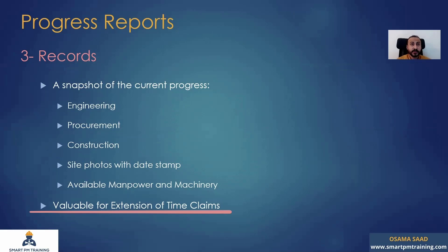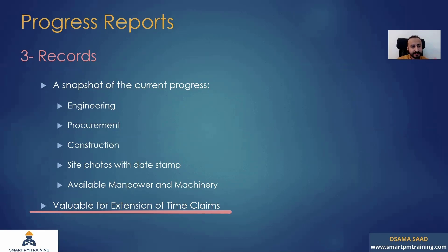For example, one month ago, you weren't able to start the paint work because the engineer could not finalize the selection of the material type. There are many things going on. One main reason is records — you want a snapshot of everything, not only the progress of construction, but engineering performance, procurement, and all other elements.